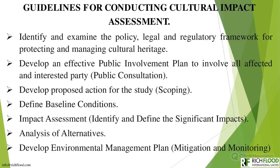This includes assessment of direct impacts associated with destruction or distortion, as well as indirect impacts that will occur during and after such projects. Criteria for selecting significant impacts include: the probability that an event will occur, the number of people including indigenous populations that will be affected, the duration of potential impact, the value of benefits and costs to affected groups, the extent to which the impact is reversible or can be mitigated, the likelihood of subsequent impacts, and any controversy or uncertainty over a probable effect.